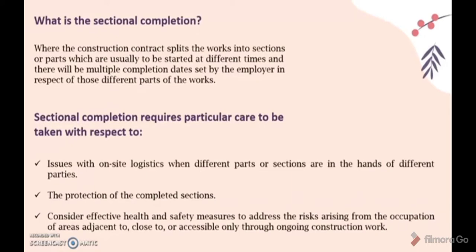Sectional completion is a common practice, especially on large projects that are completed in sections. As large projects take a long time to be completed, the employer has to wait for a long time before he could expect return on his investment. Therefore, by practicing sectional completion, it allows the employer to occupy the completed parts whilst construction continues on the other parts. For instance, in a residential development, the employer may begin promoting and selling the units of houses that have been completed instead of waiting for the whole development to be completed. Hence, the sectional completion can allow the employer to begin recouping some of its build costs earlier.